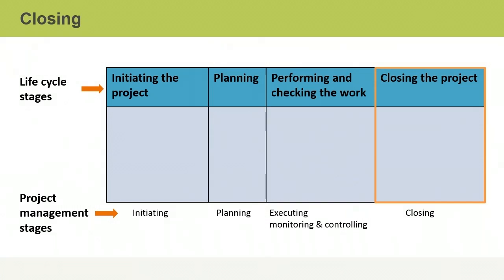The processes in the closing stage aim to finalize all activities and contracts for a project or phase. The activities include transitioning the product to the client, or for internal projects, integrating the project into daily operations. This includes training the client on the processes and procedures to maintain quality activities and deliverables. Closing processes also include project sign-off, archiving project documents, documenting lessons learned, releasing resources, and closing contracts.